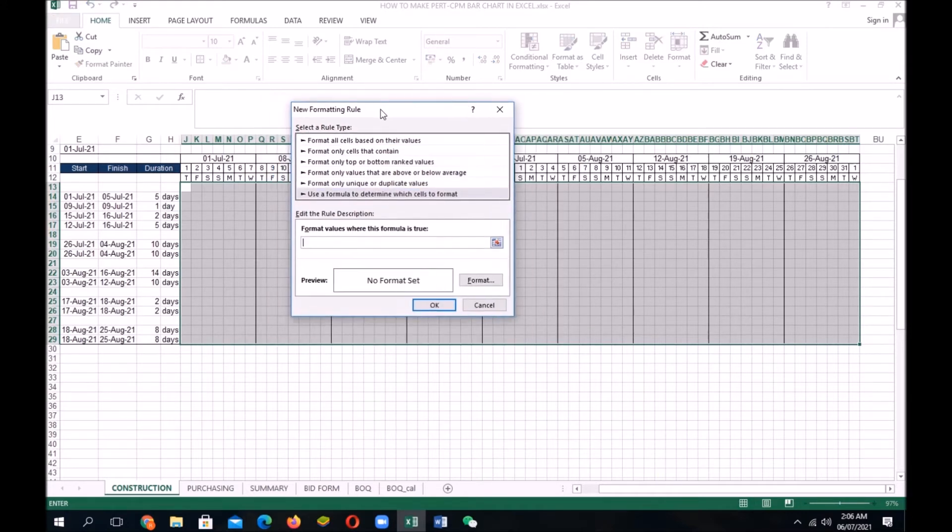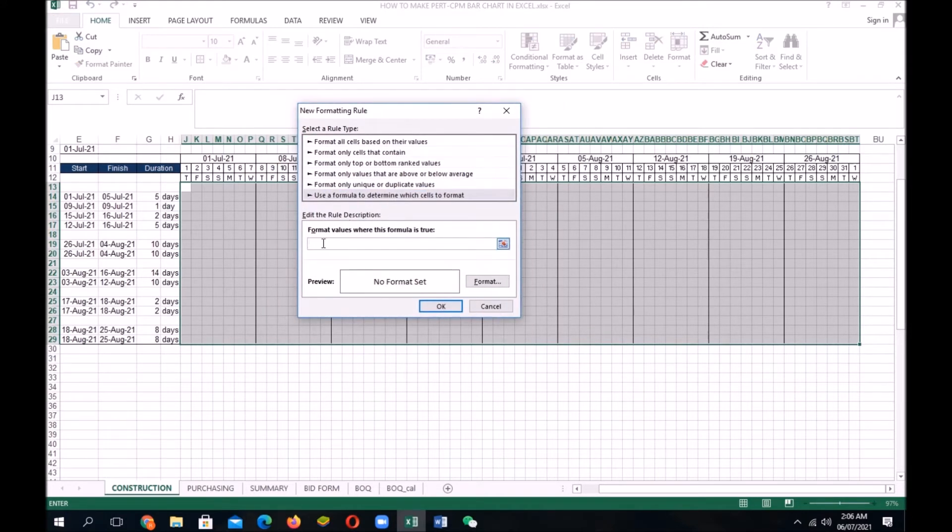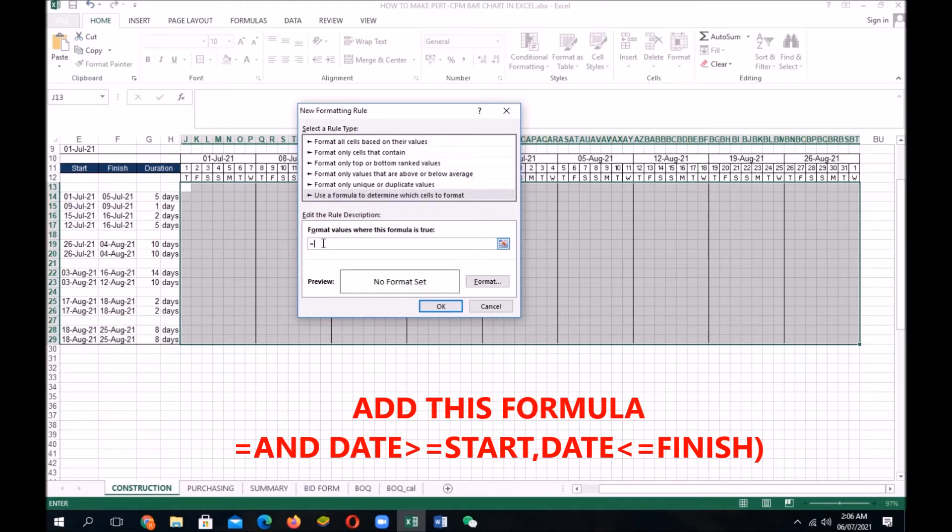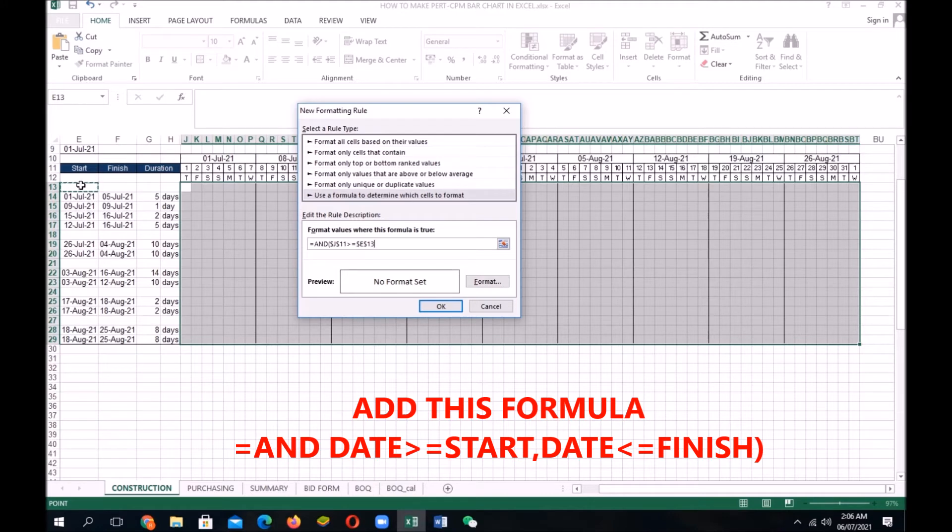Under the format value where the logical formula is, add this formula: equal and J11, greater than, equal, E14, comma, J11, less than, equal, F14, close parenthesis.